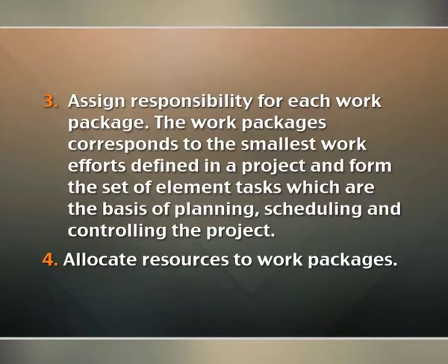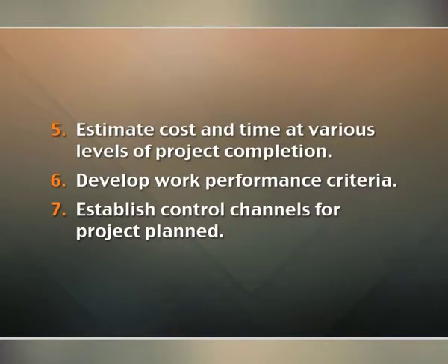Number 3. Assign responsibility for each work package. The work packages correspond to the smallest work efforts defined in a project and form the set of element tasks which are the basis of planning, scheduling and controlling the project. Fourth, allocate resources to work packages. Fifth, estimate cost and time at various levels of project completion. Sixth, develop work performance criteria. Seventh, establish control channels for the project planned.